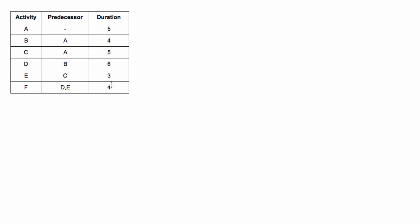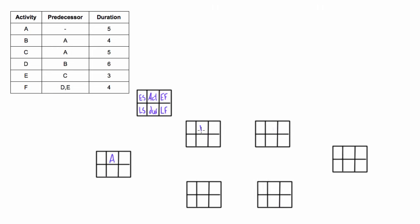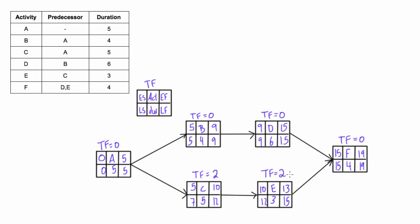First, let's draw the PDM network diagram for this table of dependencies — you already know how to do that, so it looks like this. We can then do the forward pass to calculate the early start and early finish, and the backward pass to calculate the late finish and late start. From the last video you know how to calculate total float, and by identifying activities with a total float of zero we can draw the critical path.